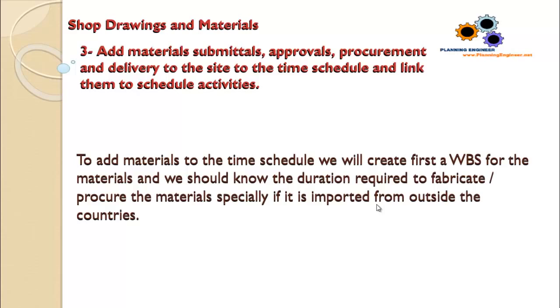We have 4 stages in the materials. We are submitting the material for the client or the consultant approval. So the first step is submitting the material. The second step is the approval of the material. The third step is the procurement or the fabrication of the material.